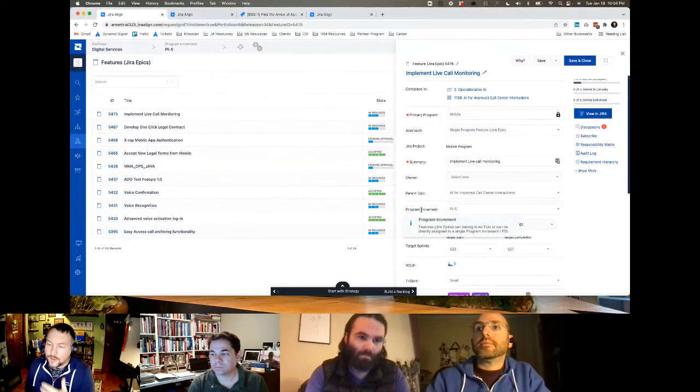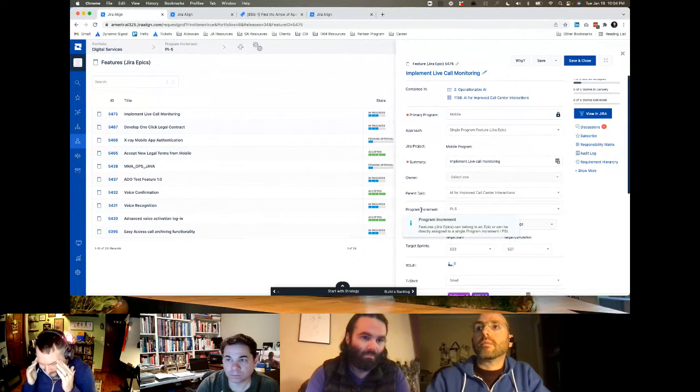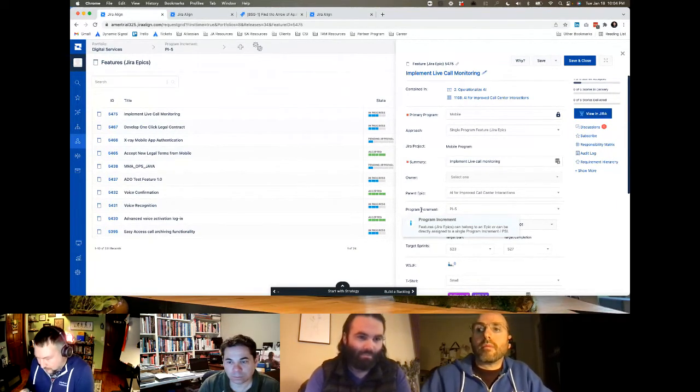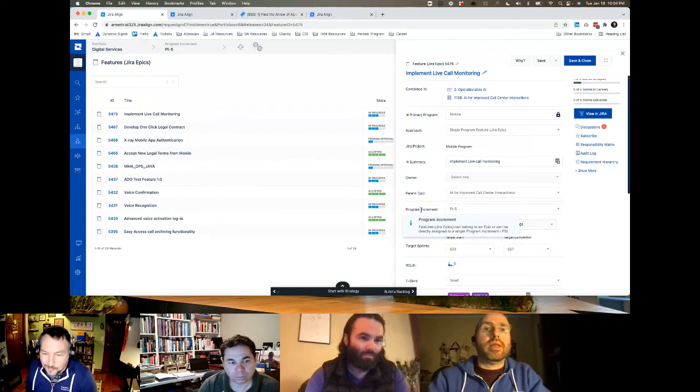And that's living into one of those principles of when we're breaking down work, whatever you set as that increment of a PI or that time frame, work should be able to be completed in that. So I would say that's probably one of the biggest learning steps when we work with organizations, is that they have to think about, how do I get stuff done in smaller chunks? And teams work in small chunks, or the smallest chunk. We then move up in the teams of teams. We say it shouldn't be 2 weeks and then a year. It should probably be something a little bit smaller in between. So I would say those are the biggest things that we work with customers to better get into. If they don't have that construct already, they struggle with it.